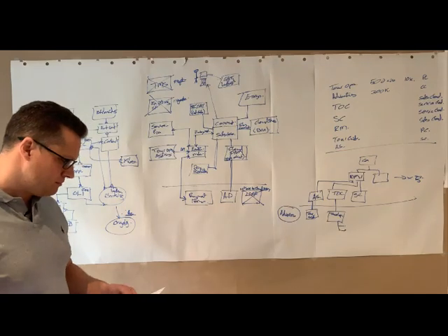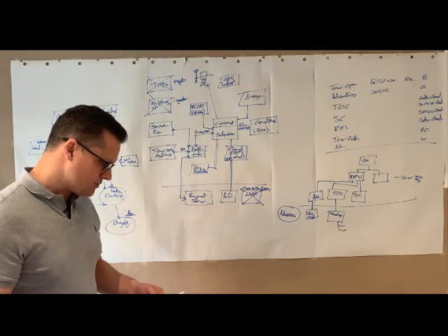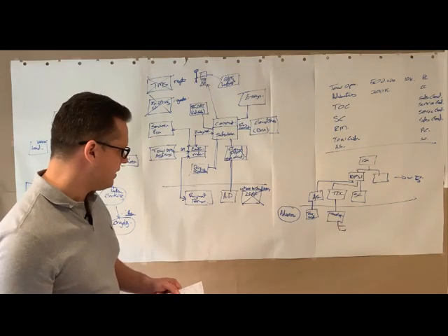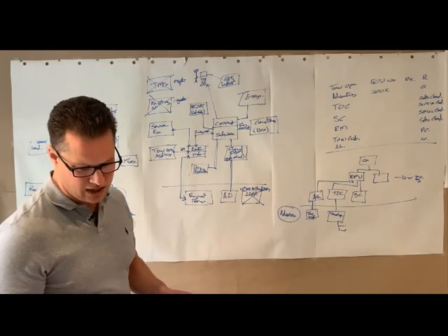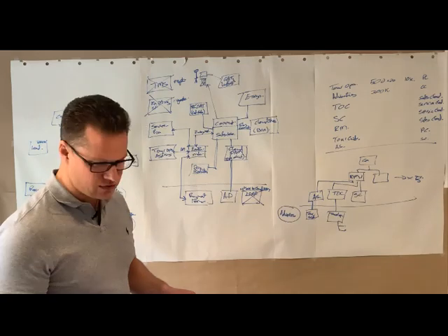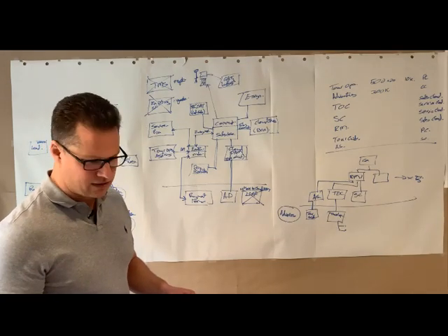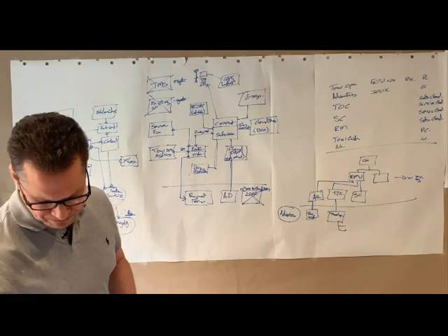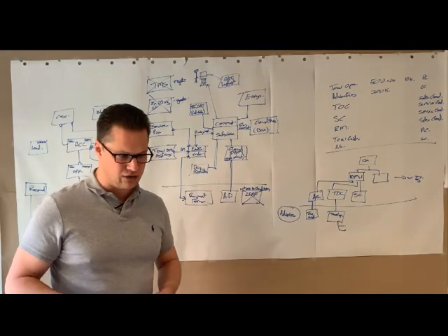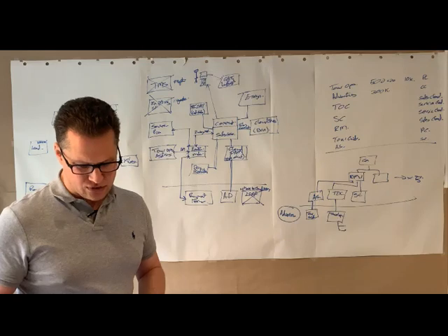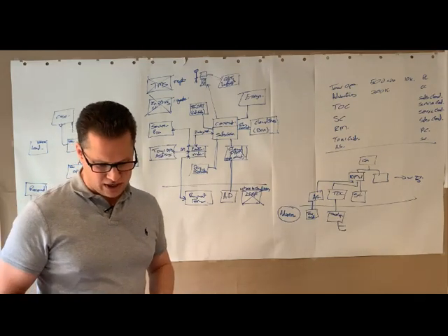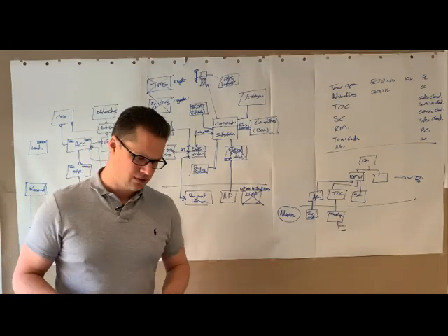Likewise, the Sales Cloud migration and the partner Payment Force integration are items that we would want to prioritize and get finalized as soon as possible. But the requirements are all known, so I think that could be planned out. So I would say we're going to run multiple work streams, Salesforce build as agile, and then our migration and integration tasks will be waterfall.